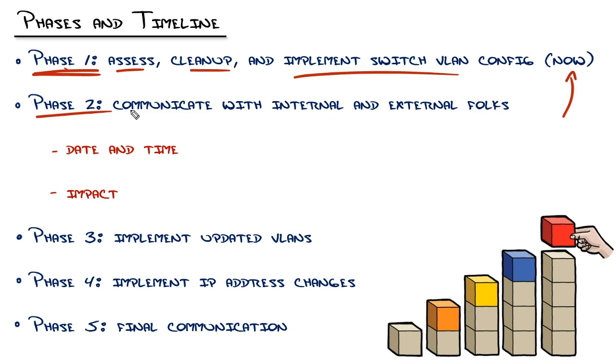Then I need to communicate with internal external folks of the date, time, and impact that I'm going to have as I do the following phases. Because after I do that cleanup, I'm going to have to implement the new VLANs and IP addresses. That's going to take everything down. How long is it going to be down? When's it coming back up? What do I do if things aren't working? That's what folks, people, human beings need to know.